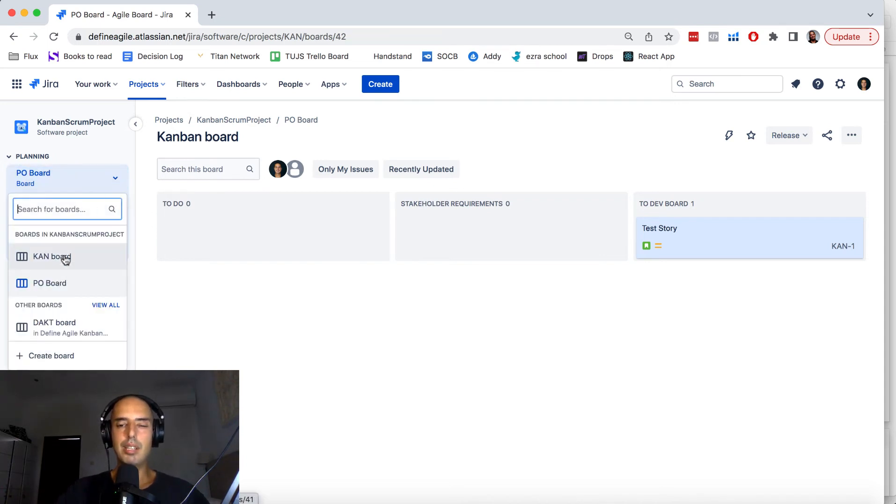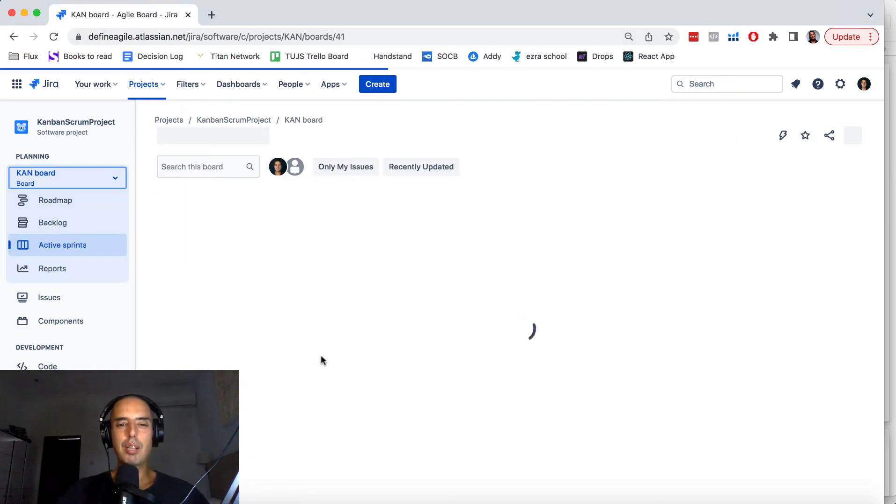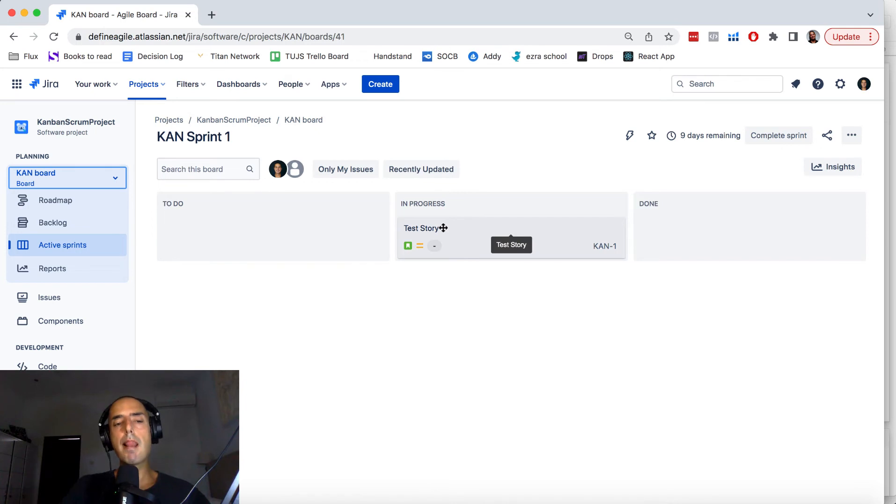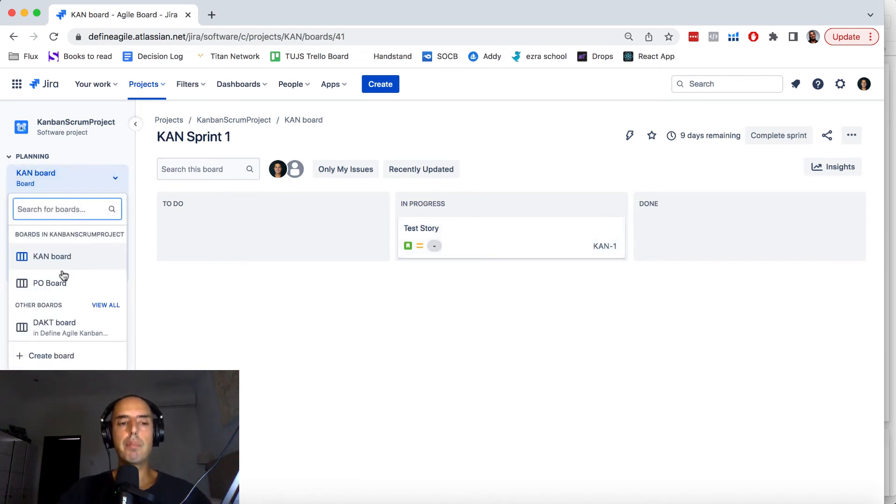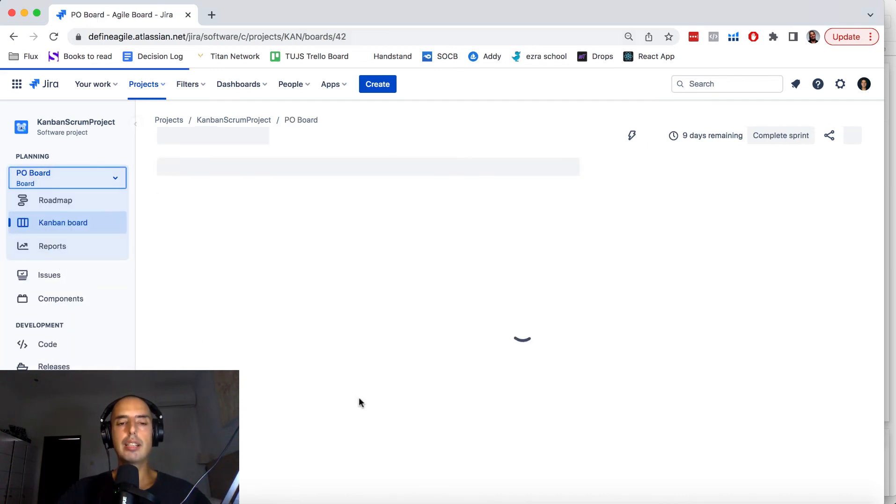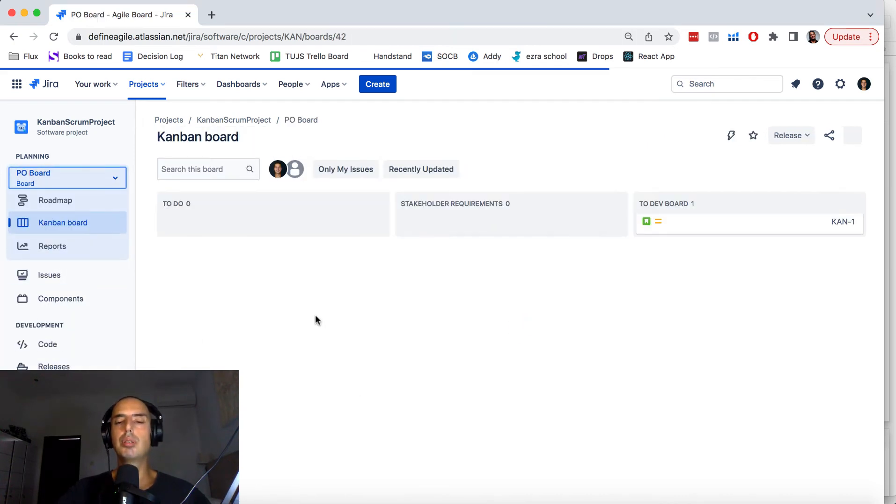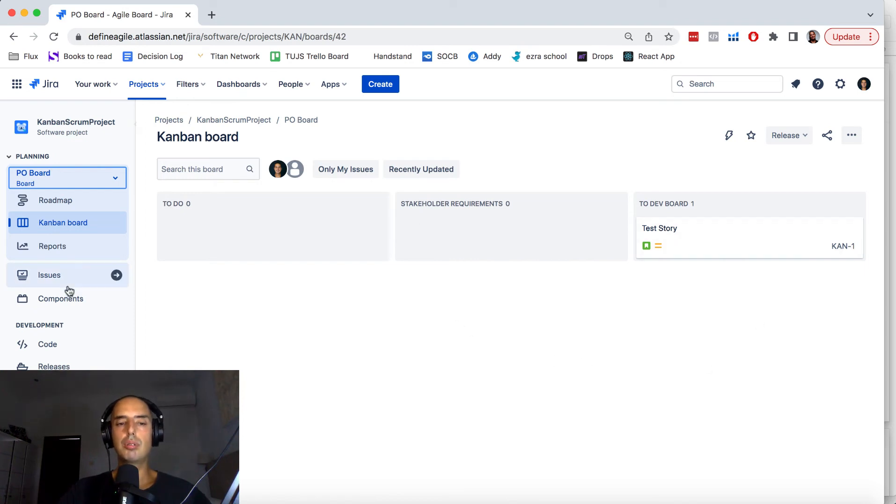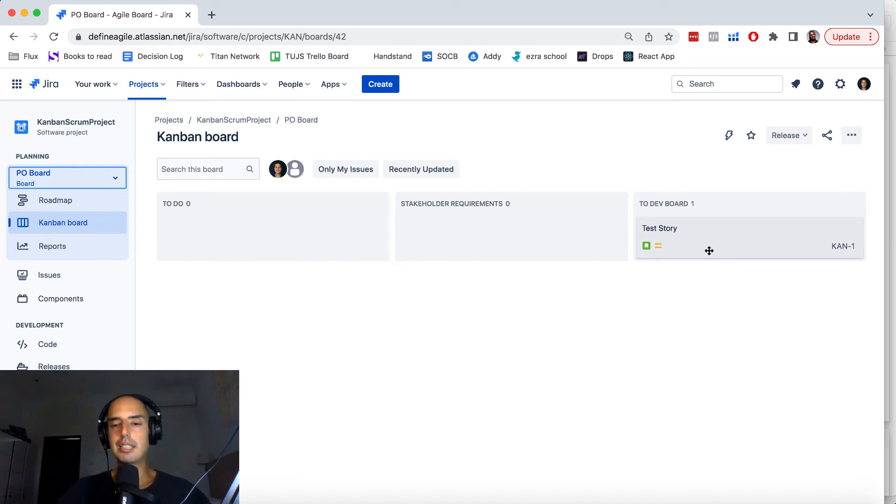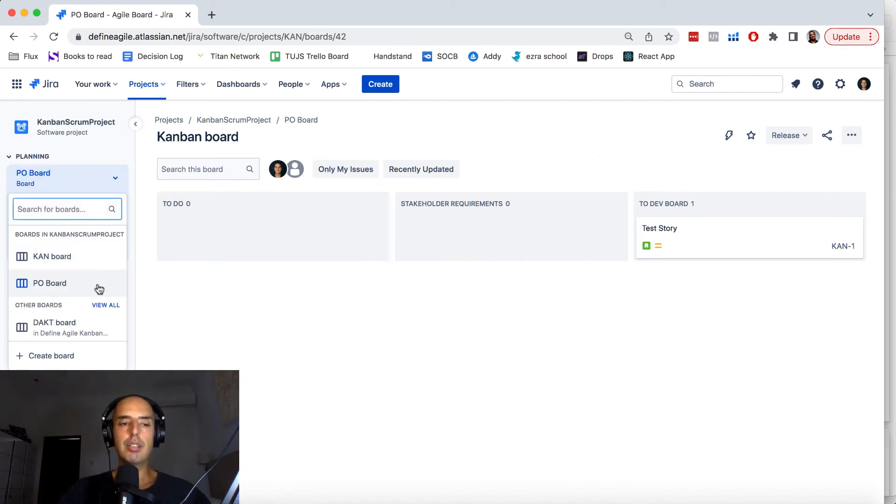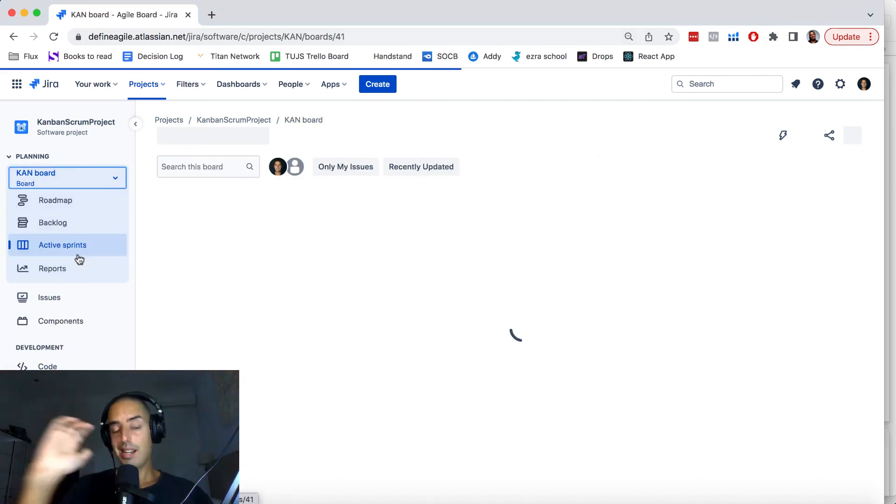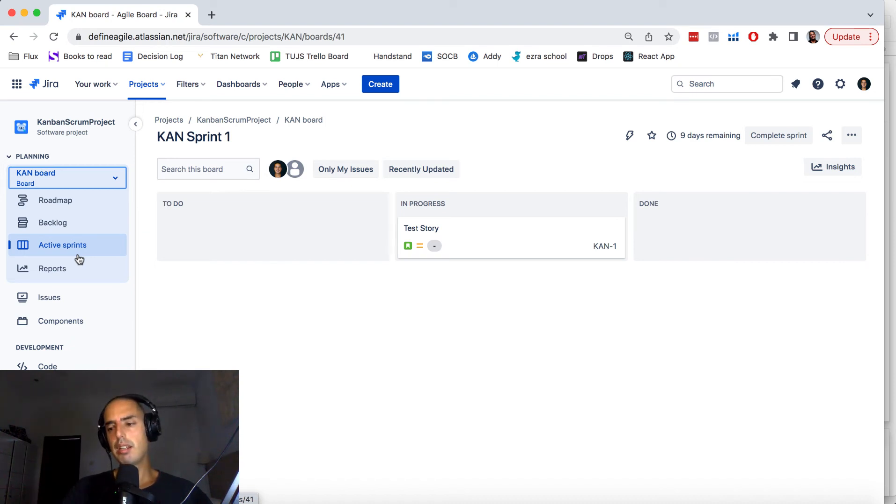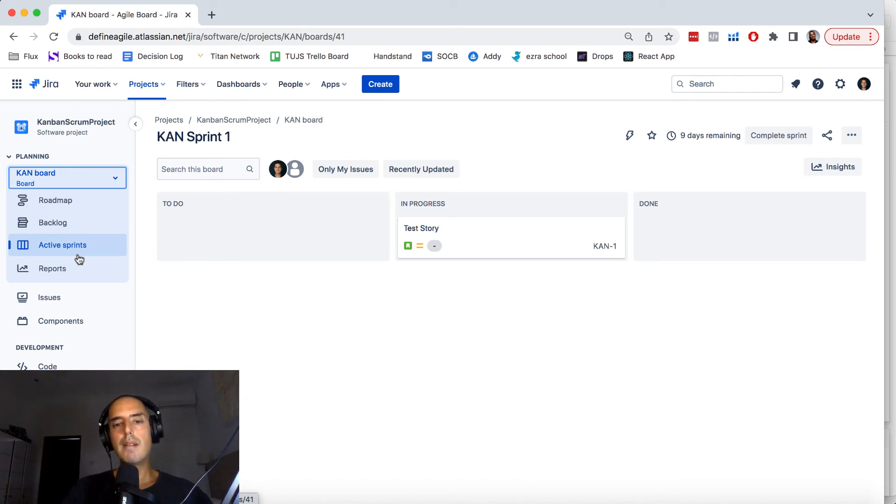I think it's better with the two Kanban boards because well you don't want to mess anything that is in the sprint right now. But you can have a bunch of those steps for your PO thing that is not related. You don't need to do, you didn't need anything, you can have a bunch of your own things that you go through in the backlog before you put it in the sprint. So let's say you're a PO and you have collect requirements, talk to stakeholders, do do do do so you go through that. And then when it's at a certain point then you can put that into a sprint and then it will appear in your developers board. I know this will be more advanced, not too many teams use it but I find that it's much better than having a lot of projects that have correlated issues.